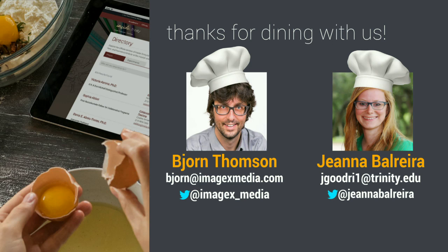That's a great question. Yeah, I'll take that. So I think it was really important for us to nail down those base themes and style guides and things like that first, so that we had our own vision of what the website would continue to look like throughout the scope of the project, no matter how far it extended. I think it's very important to have somebody on board who is going to be a very stable part of each team each time. One of the things we've really benefited from is that we use the same core developers from ImageX. When we ask to start a new project, we request the same developer and we request the same project manager, so that they're also on the same page as us and they are invested just as much in our brand and keeping our project moving forward as we are.